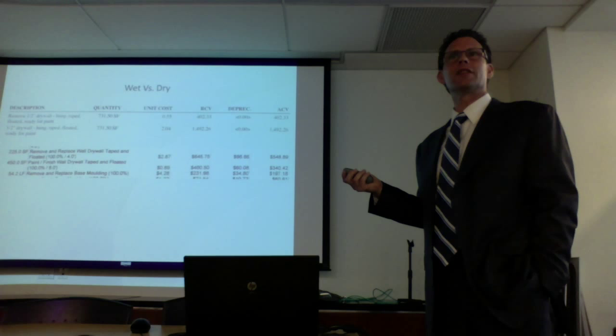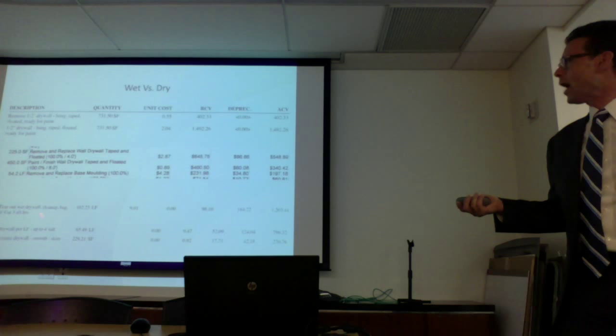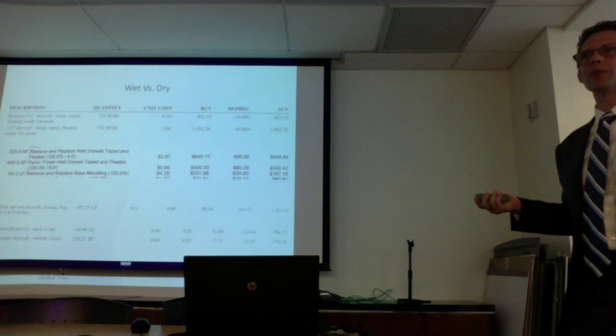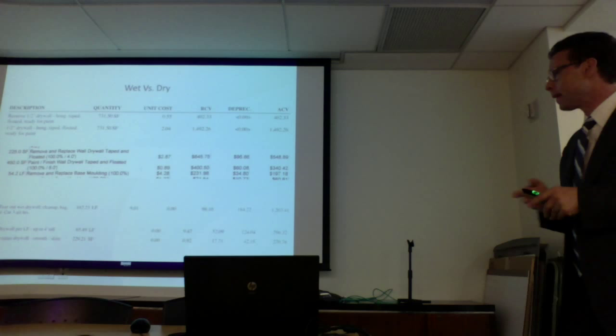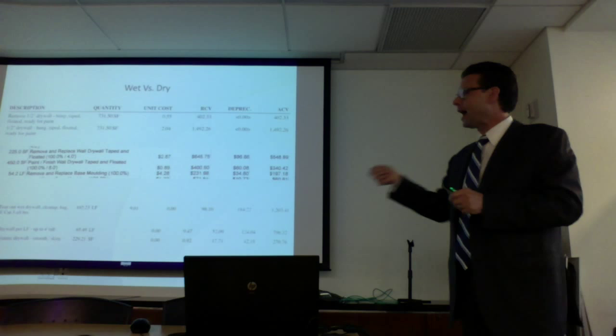And just like there's thousands of items in Xactimate, there's actually line items to tear out wet drywall up to 4 feet, and there's category 1 water, category 2 water, category 3 water. So when you do a flood cut, you'll see in the report, it's not just go in and rip out drywall. It's go in, determine the height of, not the flood line, the height of damaged drywall by using a meter and getting to where it's dry, and then it's dropping a chalk line, getting a level, and using a straight edge and cutting a razor line.